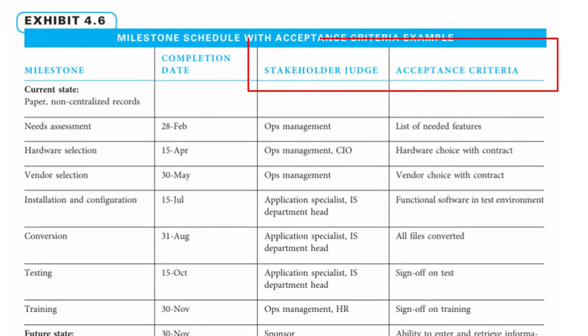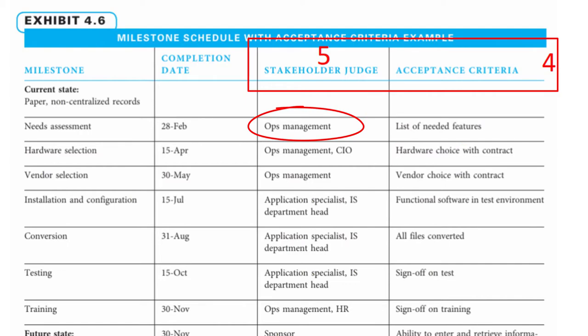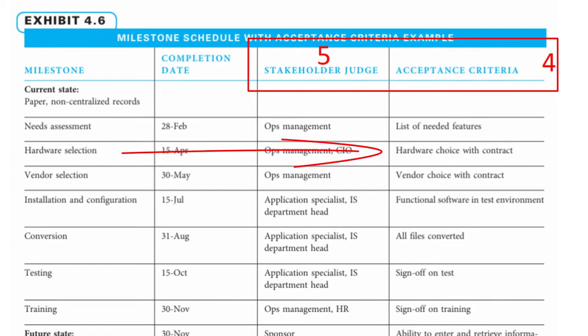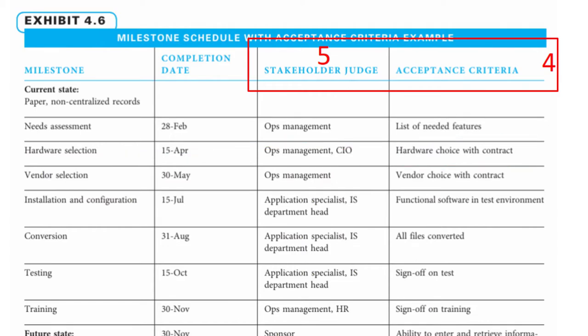For each milestone, determine the primary stakeholder or stakeholders and how the resulting deliverable will be judged. For example, the needs assessment should produce a list of needed features, and operations management will judge if the list is appropriate to indicate progression to hardware selection. The acceptance criteria for hardware selection is that there is a confirmed hardware choice and assigned contract, and so forth.